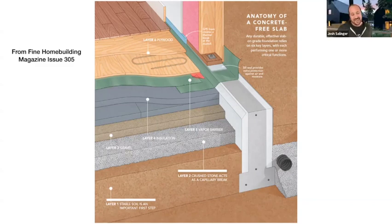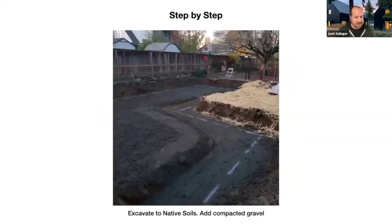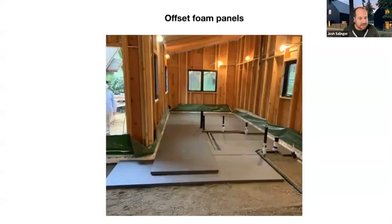Yeah. Luckily, we work with a design build company, so we bring the build team in very early on in schematic design. And we talked about this. The good thing about our team is they saw it coming and were a part of that conversation. If you know it's coming, then it's okay when it happens, right? But I could imagine that if you just threw this detail out to a typical framing crew, you would get plenty of grumbling, right?